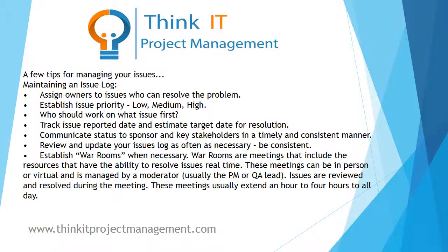Very important. This way, you are putting your team in the best position to be successful with not only managing these issues, but resolving these issues as well. You want to be able to track the progress of your issues, and one of the key components that I have in tracking issues is to track the issue reported date and the estimated target date for resolution. You want to avoid having open-ended issues in terms of when you are expected to resolve them.